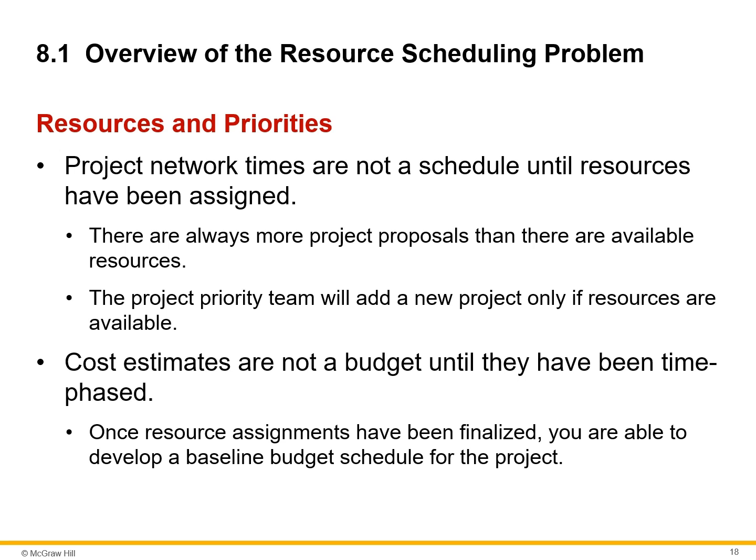The planned network and activity project duration times found in previous lessons fail to deal with resource usage and availability. The time estimates for the work packages and the network times were made independently with the implicit assumption that resources would be available. This may or may not be the case.